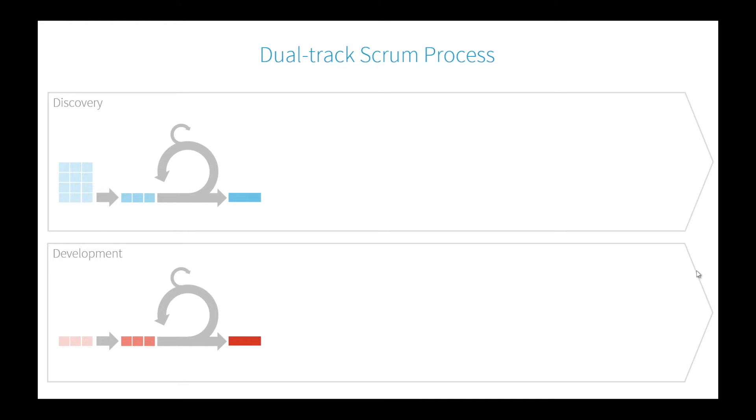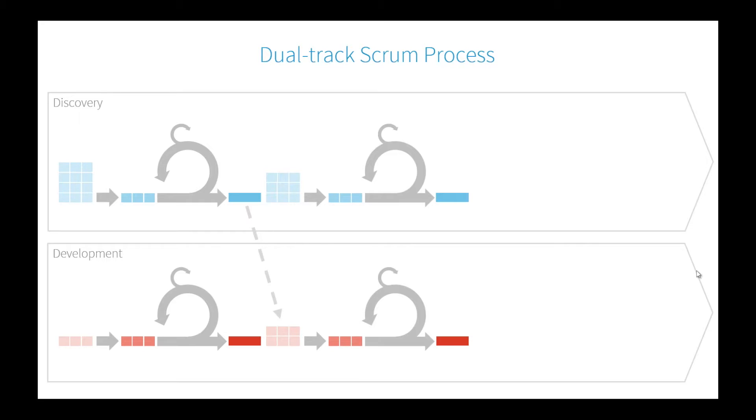Your development team may not have as much backlog when you first start. We call this first iteration sprint zero, where the development team may be setting up environments, repositories, doing technical investigations or integration spikes. They're heavily dependent on discovery formulating the designs and solution, and then the development team actually executing and implementing that.